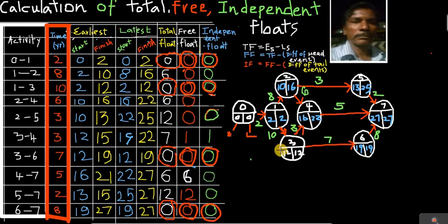So for this activity 12 is the start and 15 is the earliest finish time. You should not write 16, because in the forward pass we take the maximum value from the different arrows ending, not for this. Students make mistakes in that.